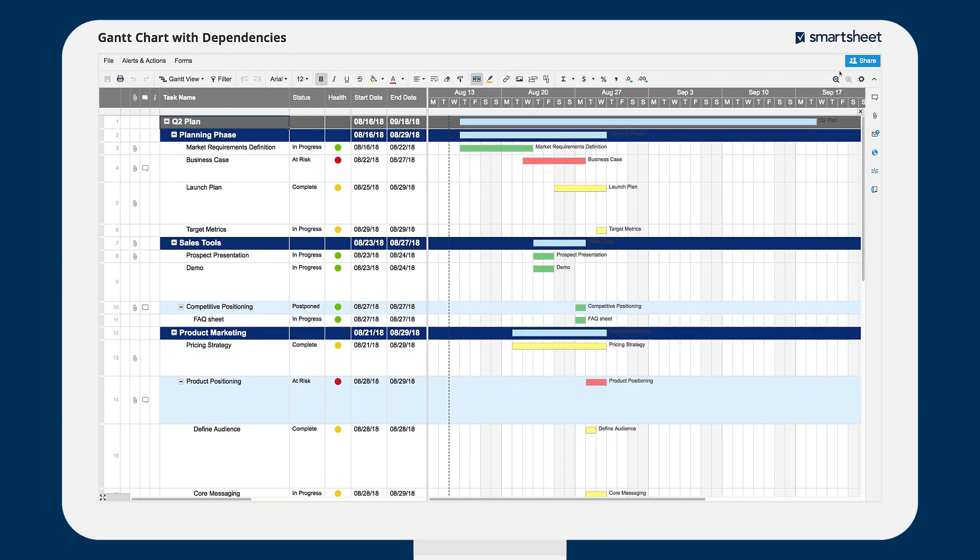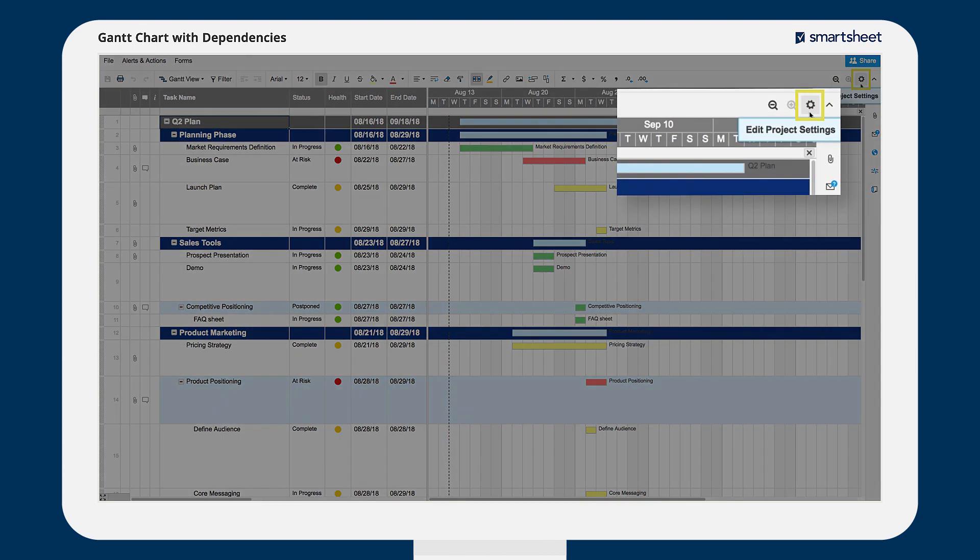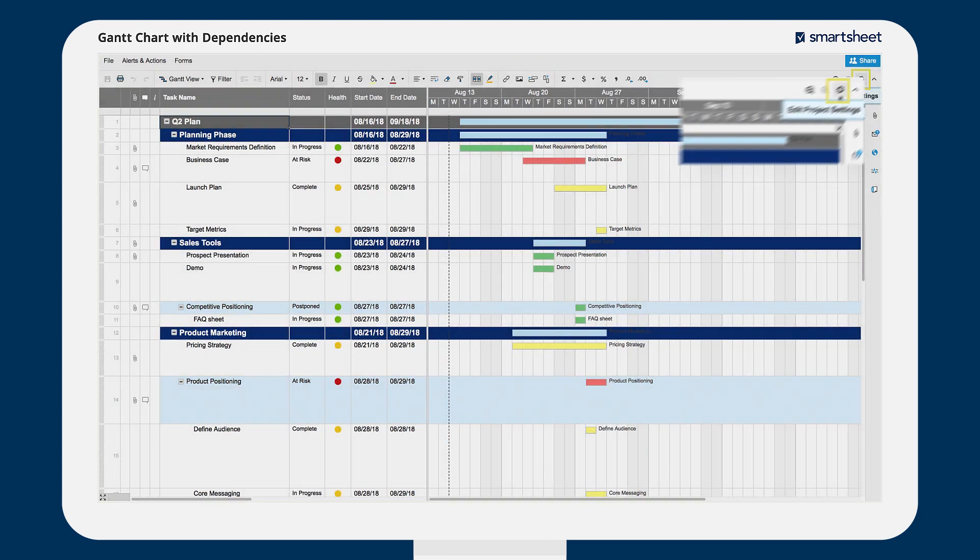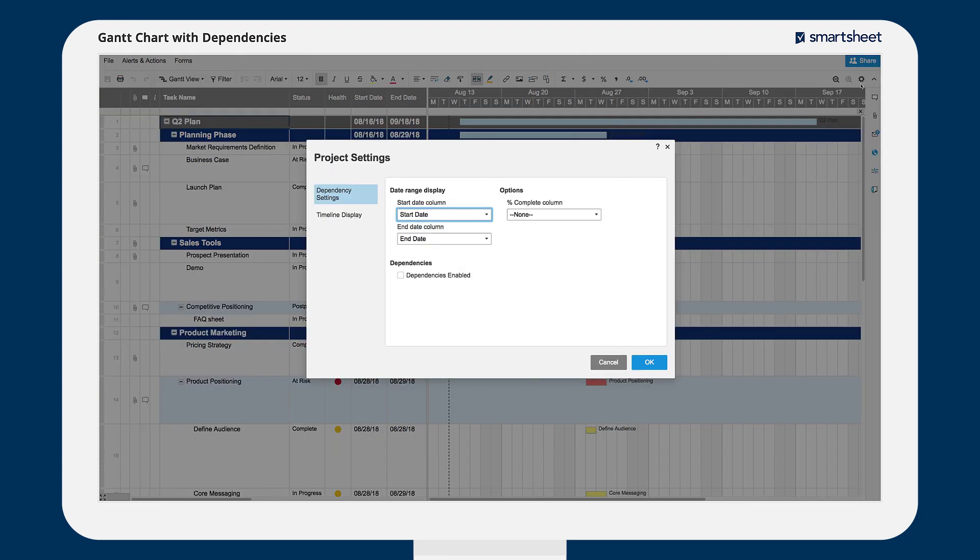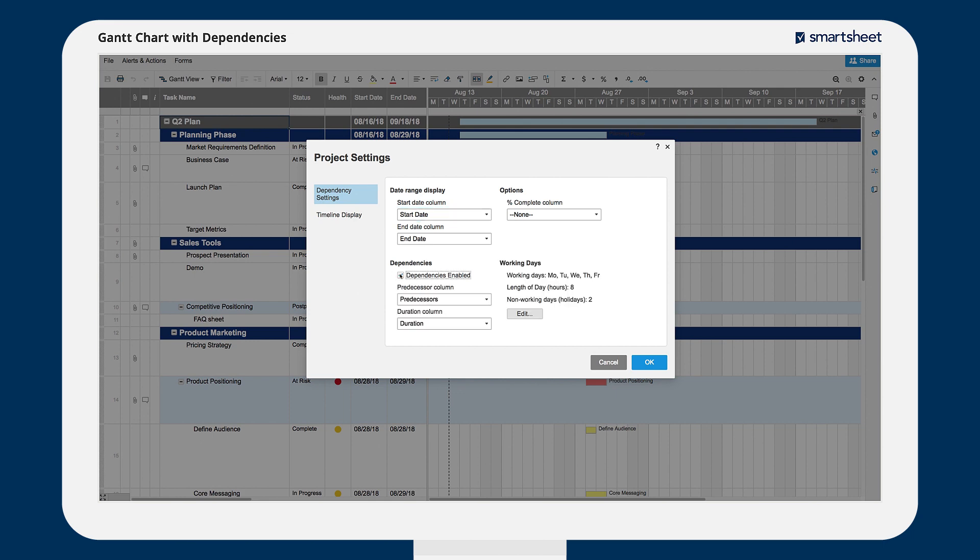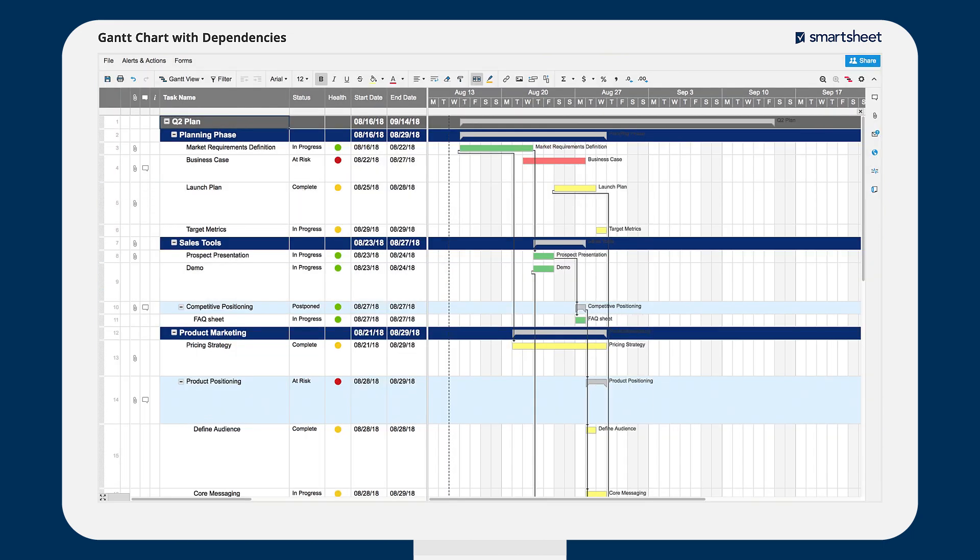Let's add dependencies to a simple Gantt timeline for an upcoming product launch. Click on the gear icon in the top right corner of your Gantt chart to edit the project settings and check the box to enable dependencies. Smartsheet will then create duration and predecessor columns for you.